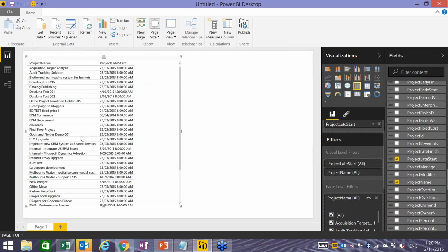Why would you do that? Because technologies like SQL Reporting Services will not support OData. Excel and Power BI do. It depends on the reporting choice, I guess.